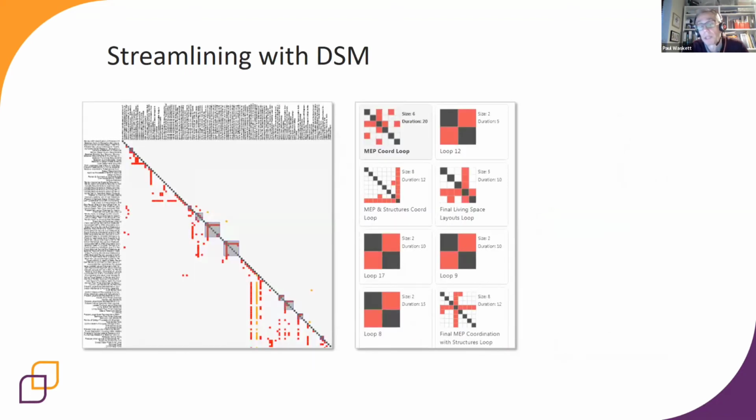So we're using DSM, as you can tell, for process optimization rather than product modeling, although there is a relationship between the two, which I'll touch on in a moment or two. And within our DSM, we have the activities with the marks in the matrix representing the dependencies. The information flows between the activities, and below the diagonal line, those are information that's flowing freely through the team. Where we have marks above the diagonal, that represents interdependence and therefore iteration. So that's those little loops of iteration that we saw in that process model earlier on.